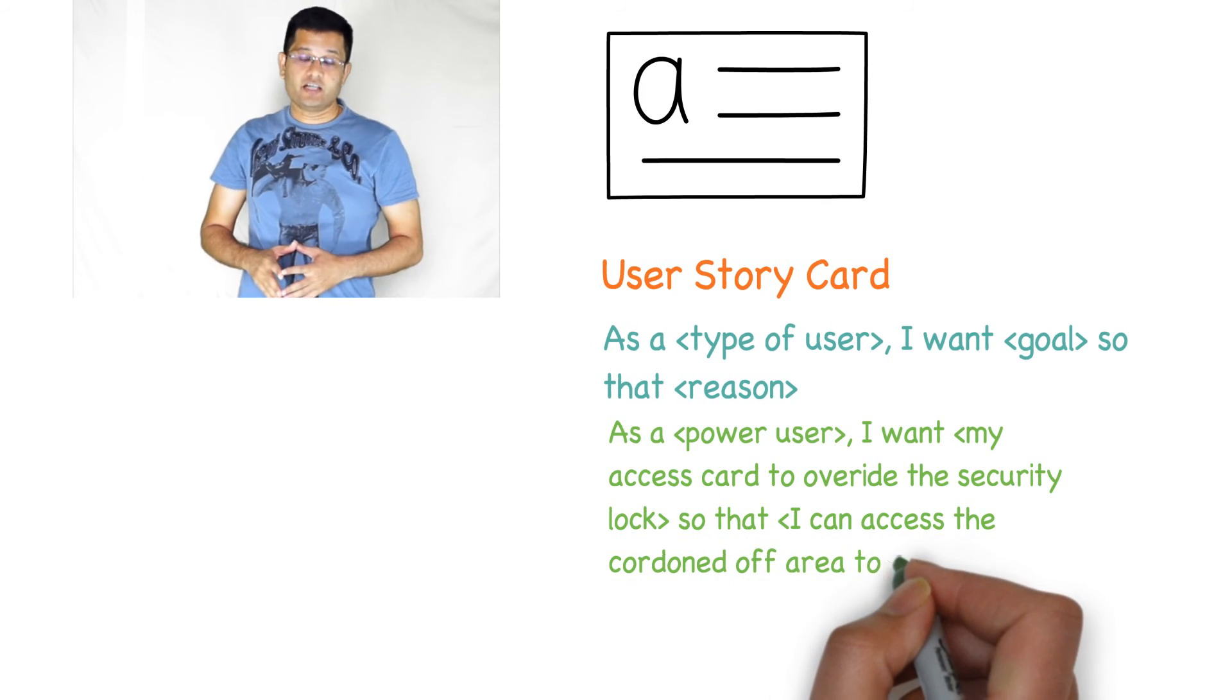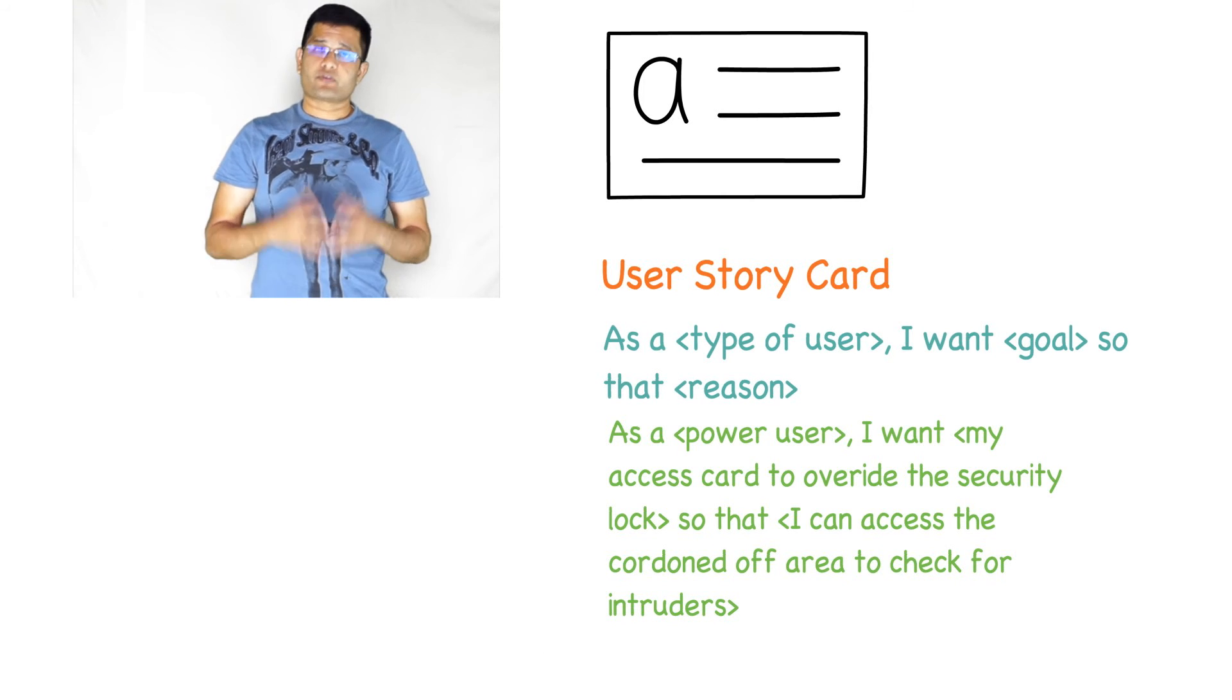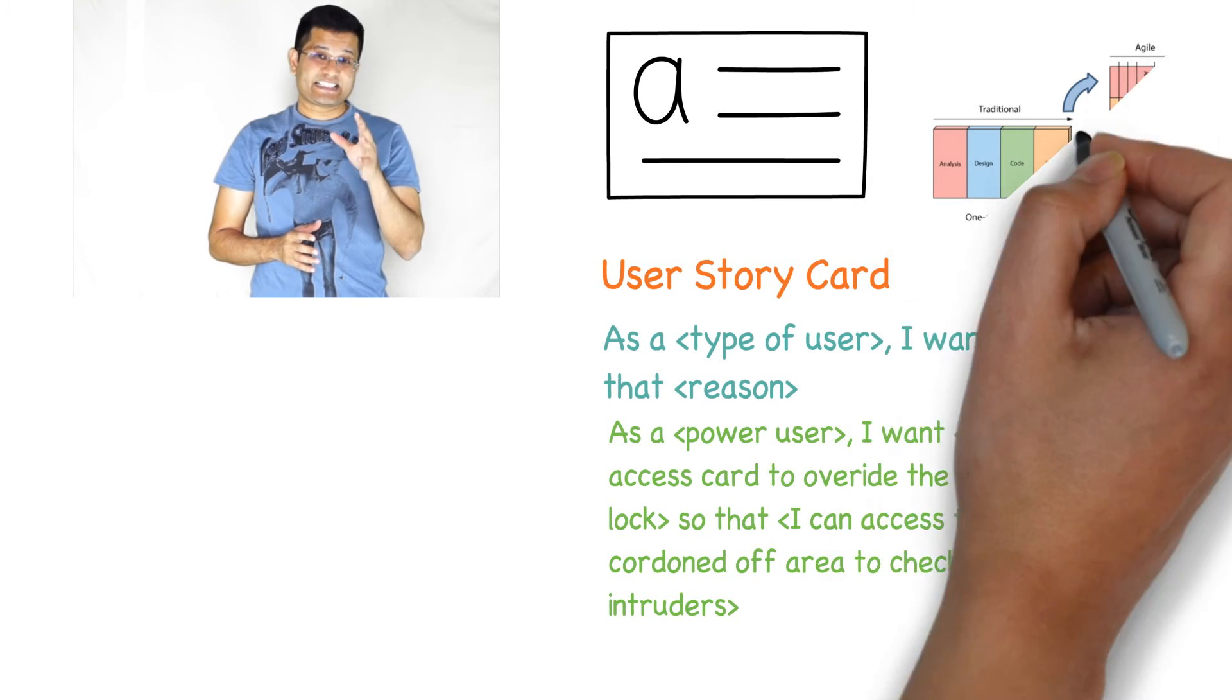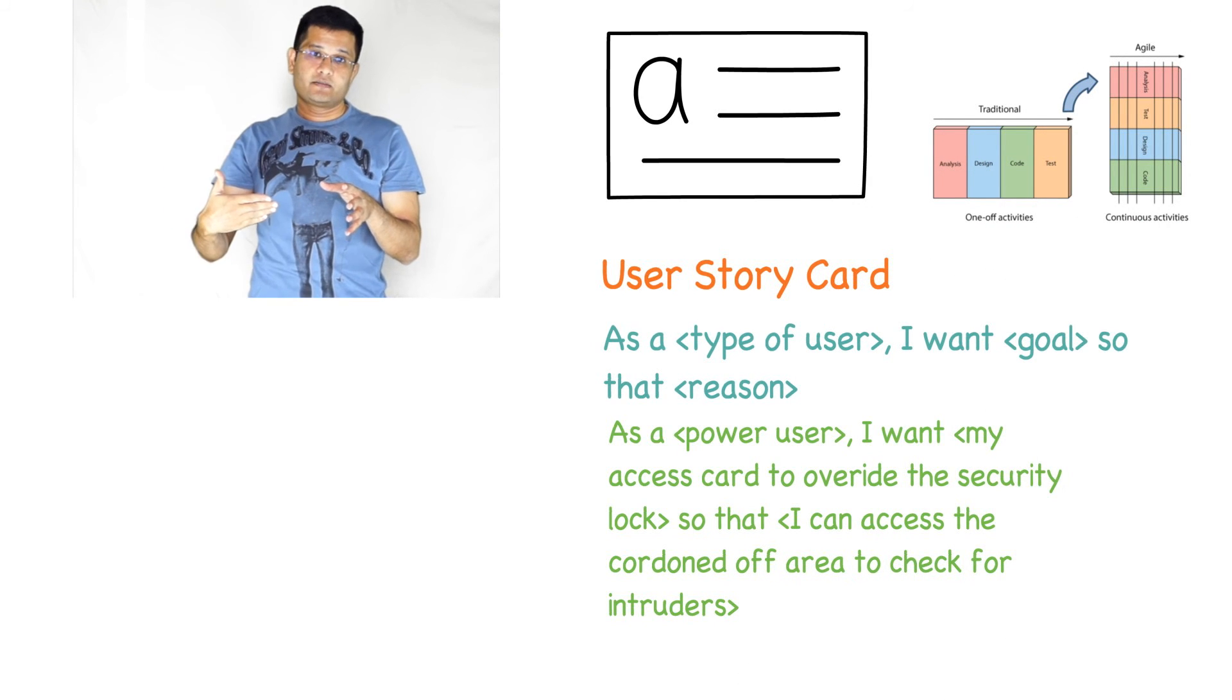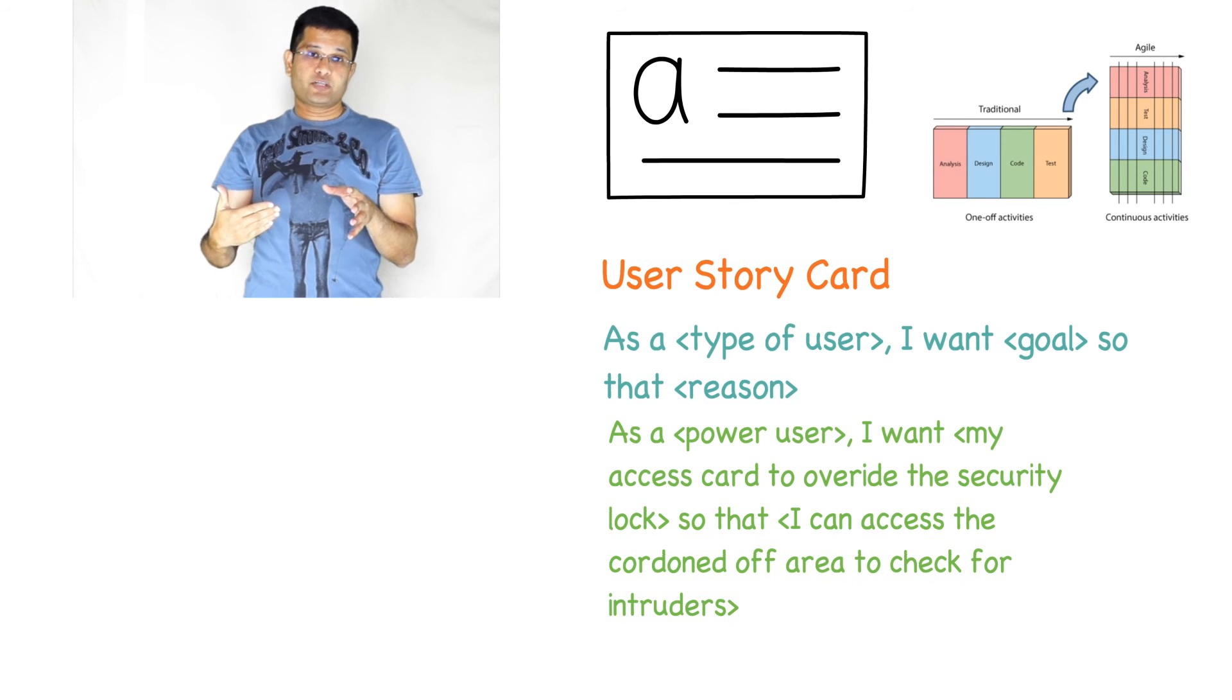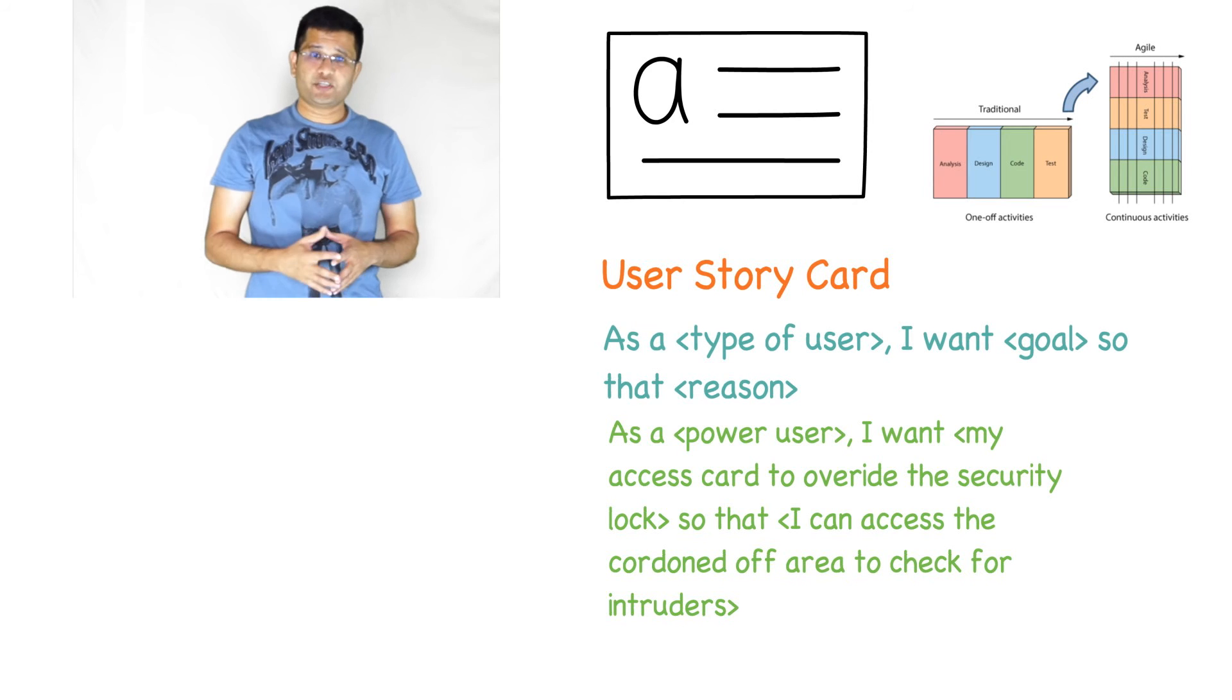An important concept when you write a user story is to be able to slice the requirement vertically so that you have a demonstrable output at the end of the sprint. As your product keeps maturing, you may start getting a lot of feedback from customers.